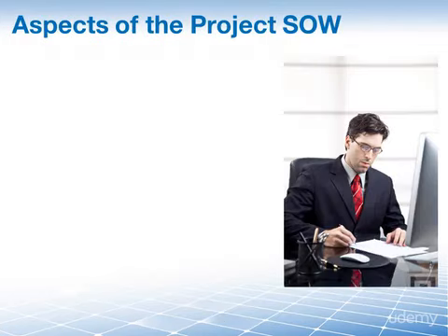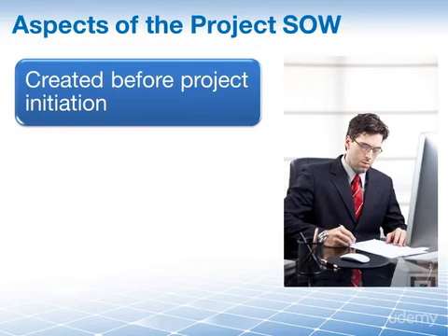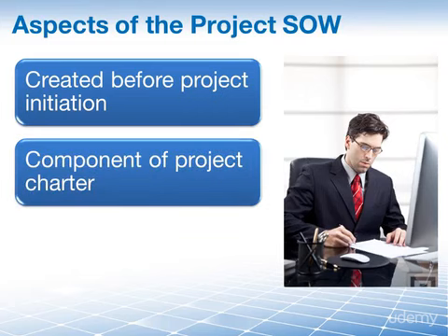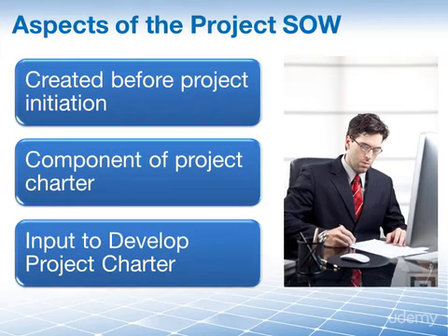You can see that similar to the business case, the project statement of work is created a long time before a project is ever initiated. The project statement of work is usually an important component of your project charter, and quite often it is an input to the develop project charter process, or it sometimes serves as a subsidiary document of the project charter.